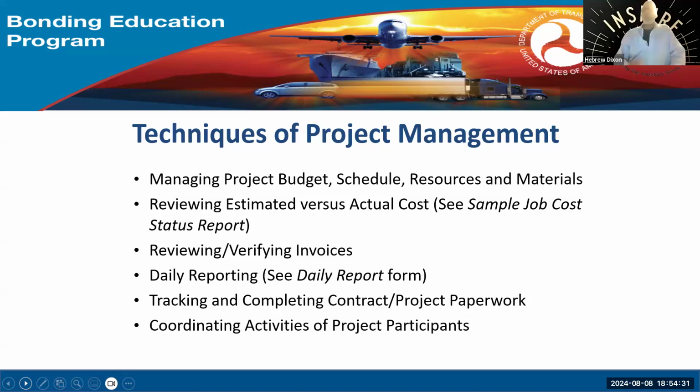So if a subcontractor was supposed to show on Monday and he showed on Wednesday, or the electrician didn't show today, it's noted. In your monthly or weekly scheduling meeting, they may come up, but that could end up costing you money down the road. Or, say, I was waiting on a decision from the client, no decision rendered, right? That gives you ammunition to make clear it wasn't all my fault, there was delay. Those things are important.